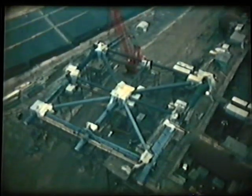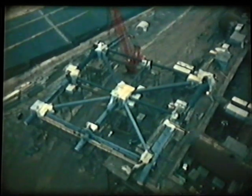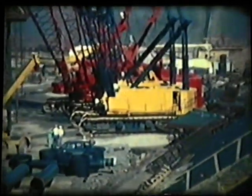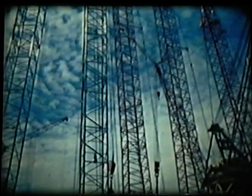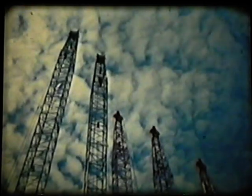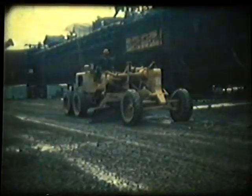When completed, each frame was to be lifted, with one side hinging in cradles on the flotation tank. These early lifts were not so heavy as those to follow, 560 tons compared with 940 tons. Nevertheless, one rail-mounted gantry and 7 crawlers combined here to lift accurately without distorting the frame. To get a smoothly synchronized lift, the crane operators were instructed by radio, and the ground in front of their machines was scraped smooth to keep all on the same even keel.